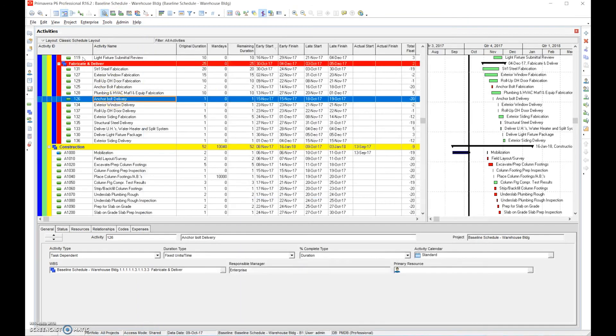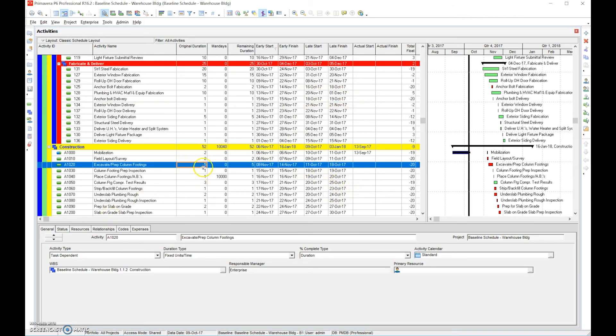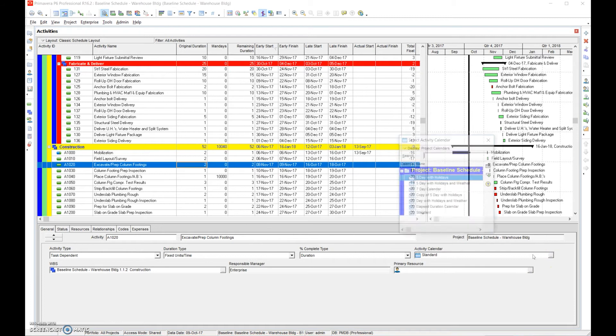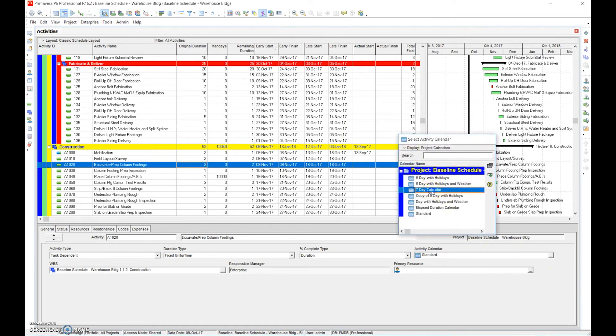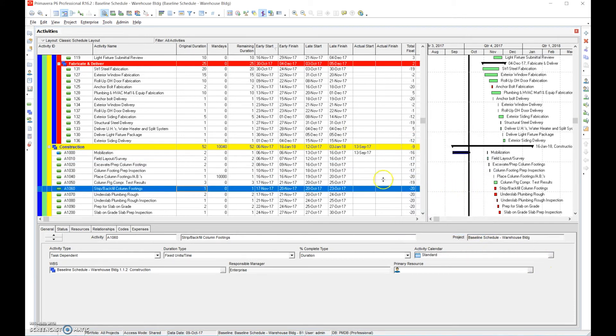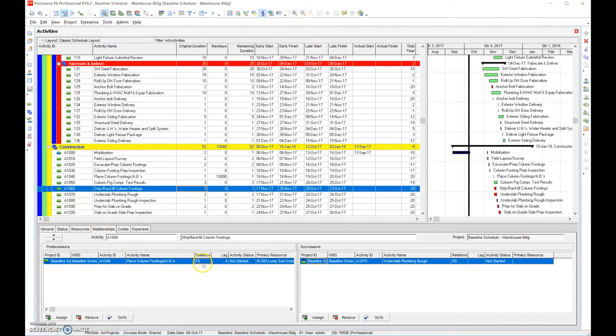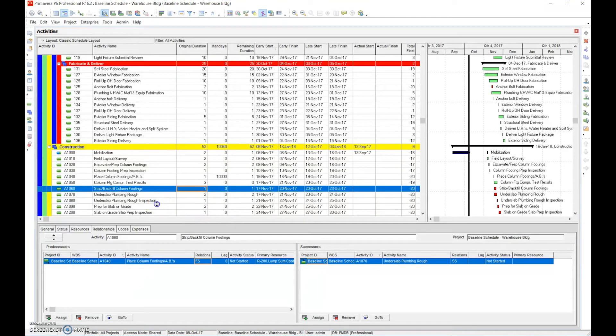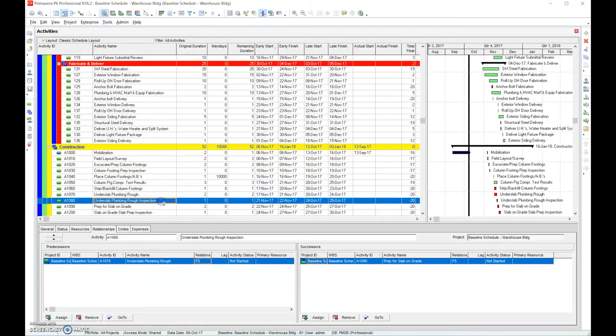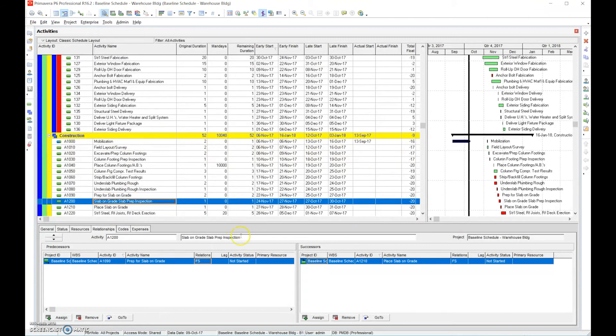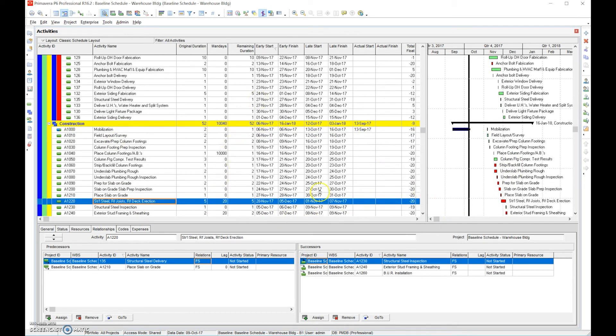So one of the steps that I can say I made is, okay, well, I went ahead and reduced the prep of the footing from five days to two days because we added additional resources. I also changed the calendar to a seven-day calendar. So there's a whole bunch of different things you can do, and you're going to describe how you did it. Changing the relationships, going from, we can't strip until we place, so that makes sense, right? But what if we say, on a slab rough inspection, nope, can't change the relationship there. But you see the point here is we want to go through, we want to look at the relationships, and then we want to document what we did.